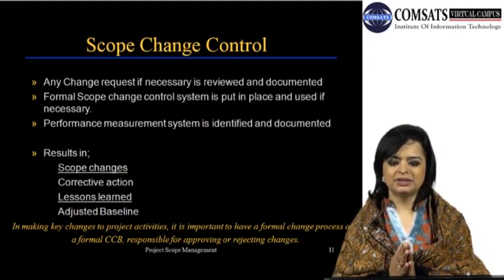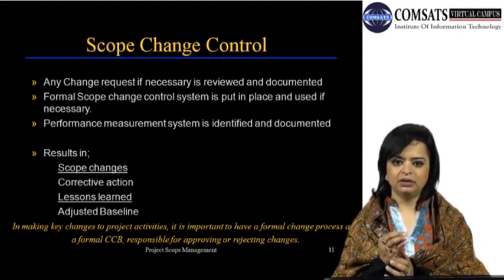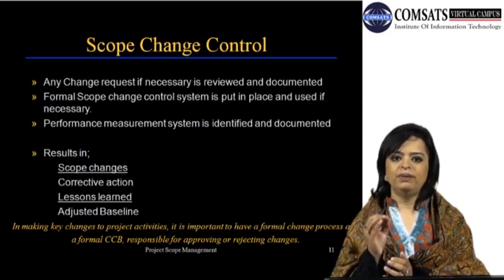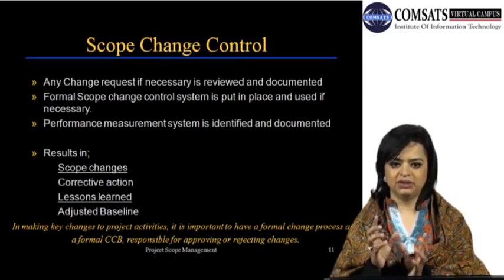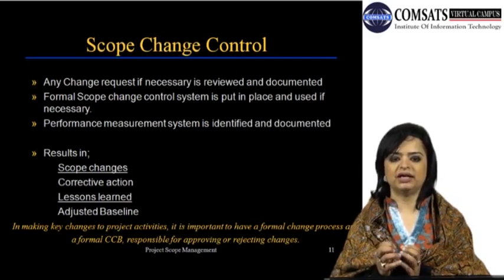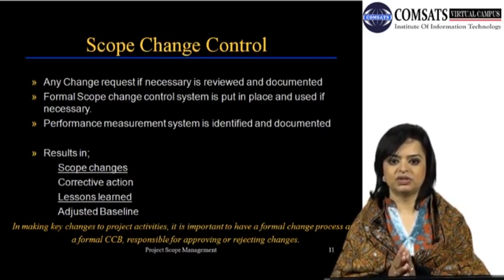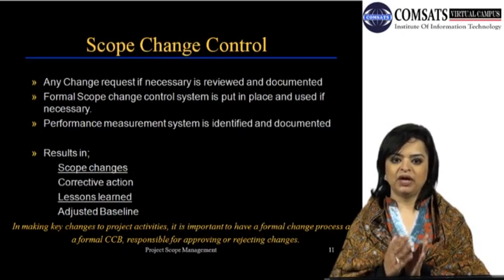And last but not the least, once the change is implemented, your baseline would have to be adjusted too. Now, what was the baseline? The definition of baseline in simple layman terms was set in stone, right? Taking a snapshot of the situation at that particular moment in time and then basing it or using that as basis for comparing your actuals versus the planned.